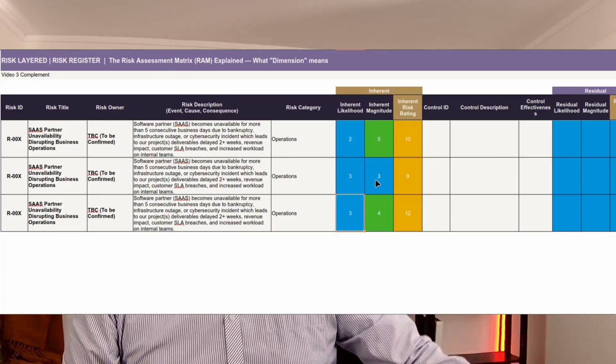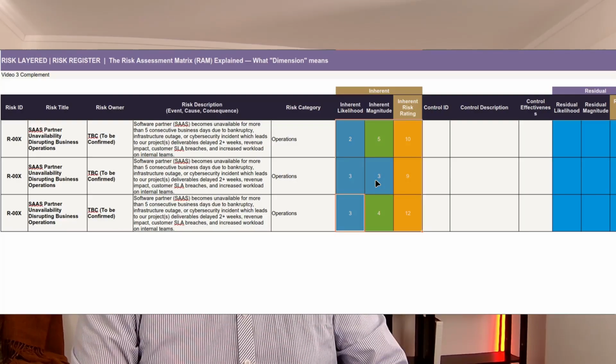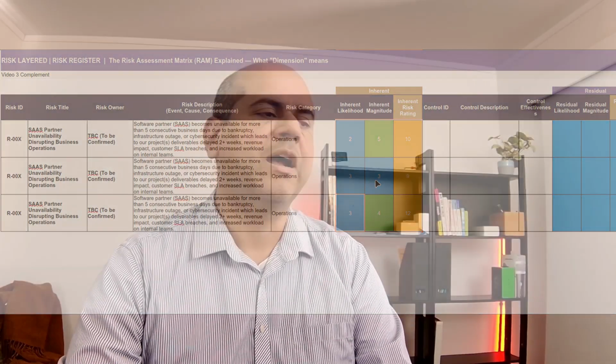And this is what I'm talking about: getting consistent in how you rate your risks, so you can have a consistent answer to them, and treatment, of course. Now, here's what I want you to take away from this video. The risk assessment matrix is the soul of your risk register. The moment it becomes useful is when you define what your dimensions and scales are in your organization and what that means, approved by the board, of course. Then you can compare and improve on it. Calibrate it once in a while, every couple of years, and use the scale for years. Score consistently, then the risk register stops lying to you.